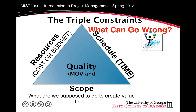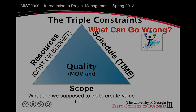A related difficulty is known as scope leap, where there is a drastic change or increase in the project's scope. For example, instead of software, a client might ask: why don't you just build me some new hardware? This would require a big change in the project's scope, requiring more resources and time to deliver with high quality. A project manager's task is to manage all of these things and look at how problems with scope, resources, or schedule might affect the project's quality.